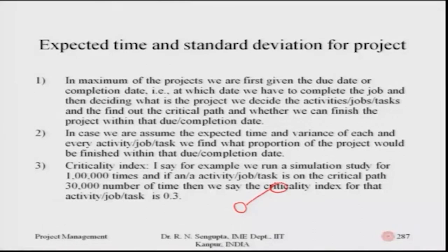So, if we have the critical index of many of the paths, then what we will do is rank them from the highest critical index to the lowest one, and choose those paths which actually make sense to complete the job, because it may so happen that if we add up the topmost critical index paths, they may not make the overall job complete. I will just spend 1 or 2 minutes on this. Say, for example, the critical index of this path, this path and this path, and if I consider the top 5, they are coming into the picture.